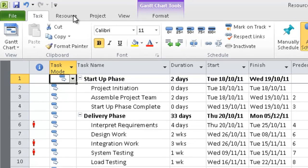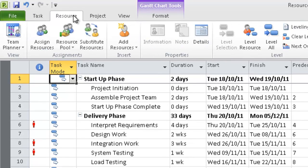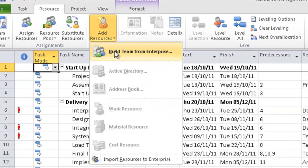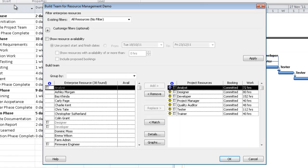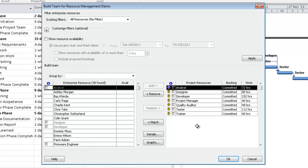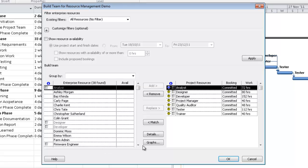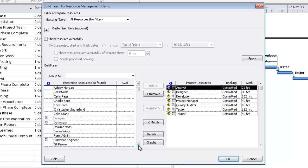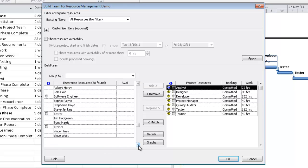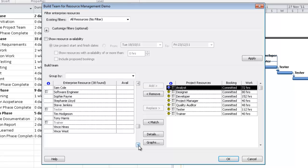What we need to do at this stage is find named resources with availability on the appropriate dates to do the work. In order to do that, I go to Resource, Add Resources, Build Team from Enterprise. This dialog box appears, and on the right-hand side is a list of all the generic resources that have been assigned to the project and how much effort is required from each one.